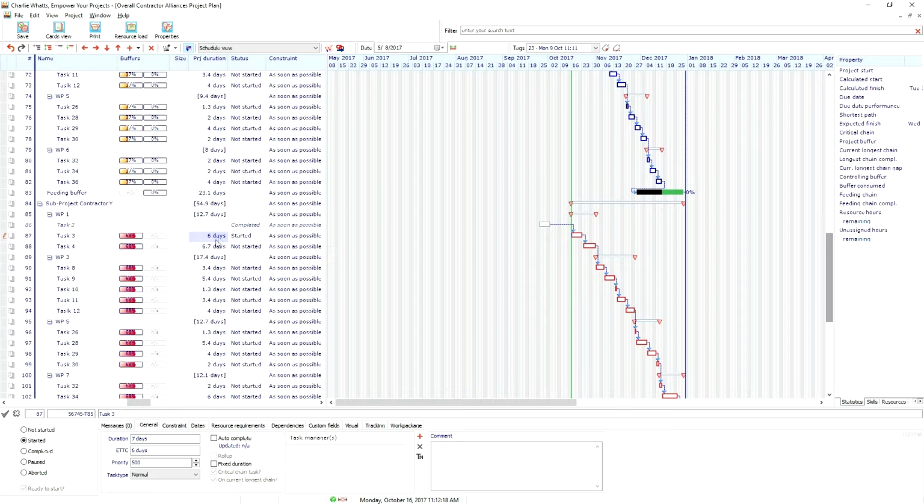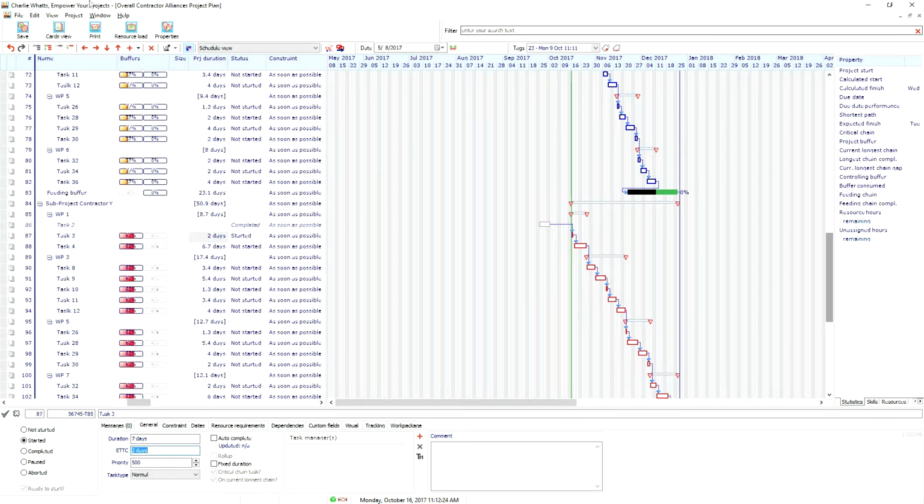Every week I get an update from them on their estimated time to complete for their active tasks, and I just make the updates in Links. Just like this, giving me full insight in the progress of all projects without being overwhelmed. I just need to do 6 updates a week, that's all.